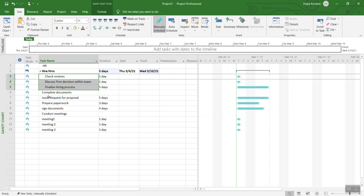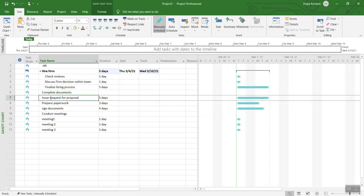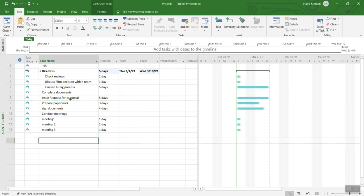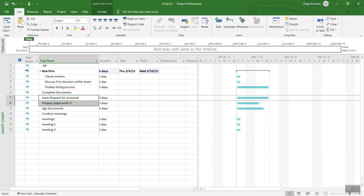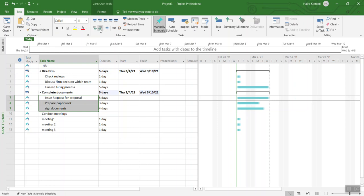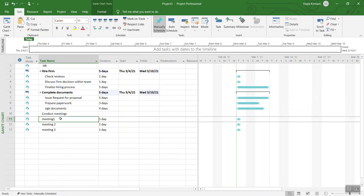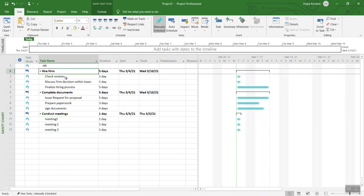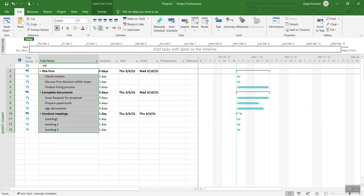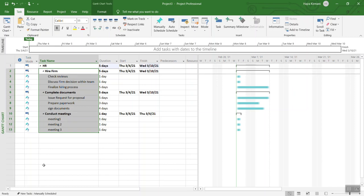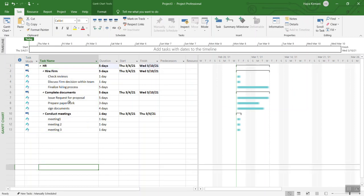Similarly, what I identify is that these three tasks - issue request for proposal, paperwork, signed documents - they all fall under completing the documentation. I'm going to do the same thing with that and then do the same thing with the meetings. Now what I see is that all of these actually fall under human resources, so I'm going to place all of them under human resources.